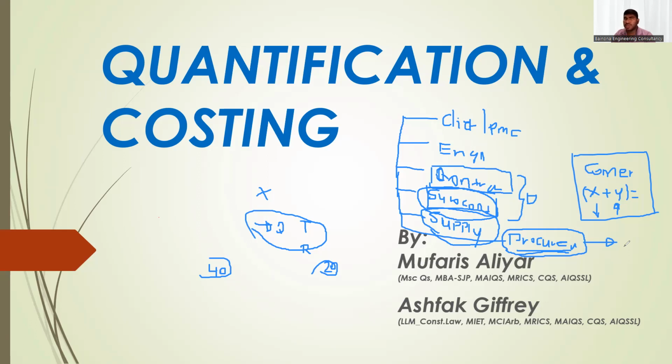Being involved in the payment is also a kind of cost control, because if your subcontractor is asking for more payment, for example, a cutoff date of end of July, as per your original plan to your company, the cash outflow to the subcontractors should be 1 million by end of July. Okay. But you receive a payment application from subcontractors which reaches 1.25.